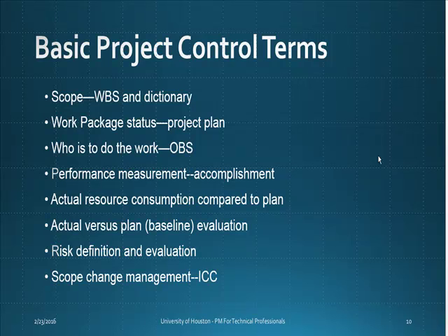Whenever there is a scope change request, you will have to strictly follow the ICC process to make sure that all the impacts associated with the scope change are evaluated and assessed, all the scope changes are approved, all the changes are documented, and your plans are adjusted based on the approved change. So that is a formal process, and we call it integrated change control.